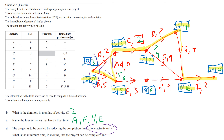If you crash B by 3, then B becomes 2, so A and B are equal. Crashing B by 3 reduces the whole project by 3, making the total 20 minus 3 = 17. So the minimum time is 17 months, achieved by crashing B by 3. Keep repeating crashing questions until you get them right.